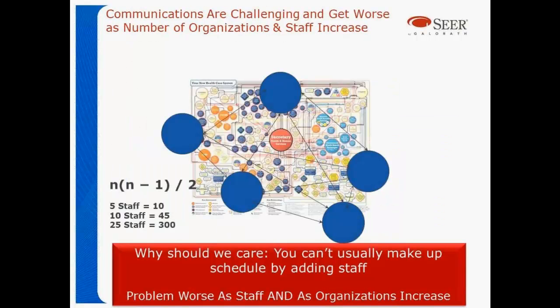Now, part of what happens, and you can see in the background there, we've got some of that scary chart that Lee put up earlier with all the different pieces, and he said this wasn't everything, but every interconnection with over 20 contractors, over 55 contractors, many of the contractors had to communicate with each other. Every time you have a communication path, you have more problems and more time delays. It happens at the lowest level with staff. A project with 20 people has more communications issues than a project with 10. But looking at 55 different contractors, the problems are just orders of magnitude bigger as communications issues abound, and the project gets less and less productive.